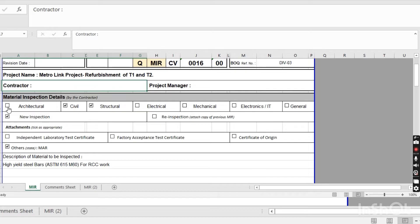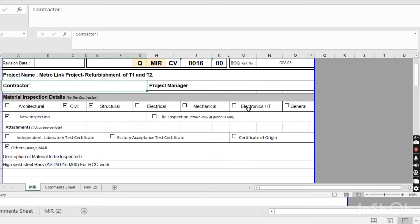If you purchase architecture materials, you click on architecture. This MIR form is for structural materials — steel — so here I click on 'civil and structural' because it is high yield steel bars. If it is electrical, you click electrical; mechanical, electronics, general, like that.